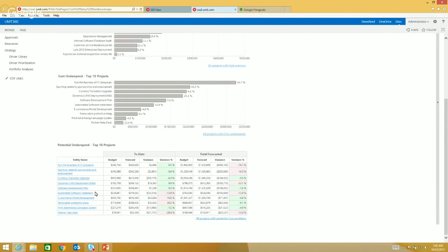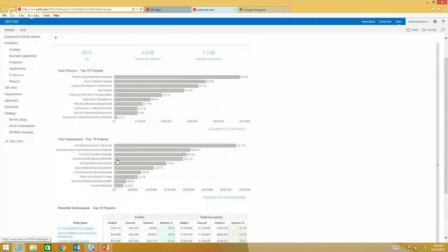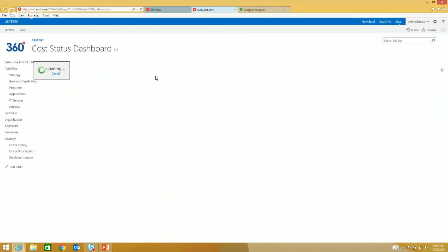And certainly this tends to happen a lot in Q4, giving the PMO and financial analysts no time to reallocate the funds and utilize that within that same fiscal to drive value. And so what happens is that money doesn't get utilized and value goes begging. So by organizing projects into these kinds of views, you can start to take action. These projects are on a watch list and you may take money back from them. These projects you expect the project manager to free up funds and release automatically. And these projects you're going to make a decision. Am I going to invest more in these or am I going to bring in net new for that? Now, that is the dynamic reallocation framework or foundation.